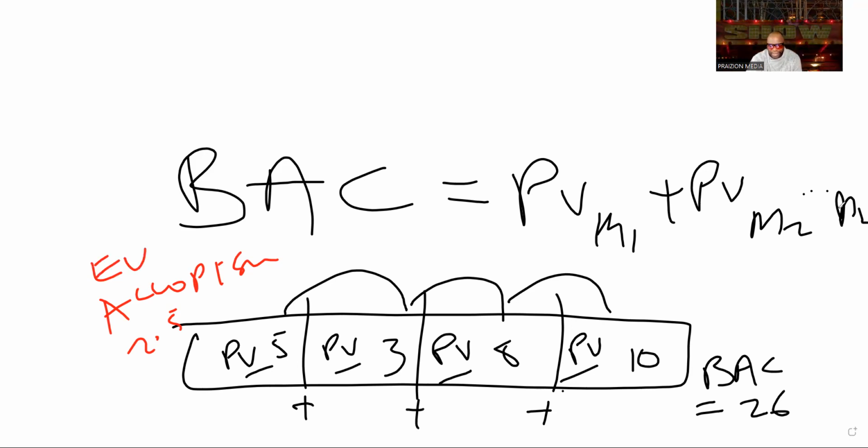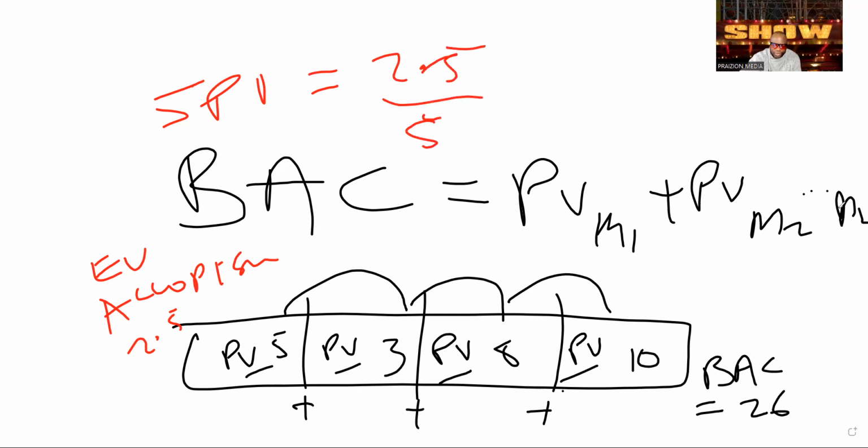That's where we would look at the schedule performance index, because it is earned value of 2.5 divided by the planned value of what you decided you were going to do but never did. So this is now 0.5. You're only 50% efficient schedule-wise. I like to think of what Chris said in the beginning: always try to pragmatize it, put it into a real-world situation.